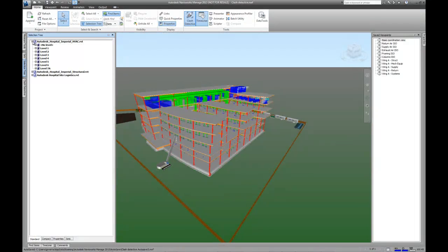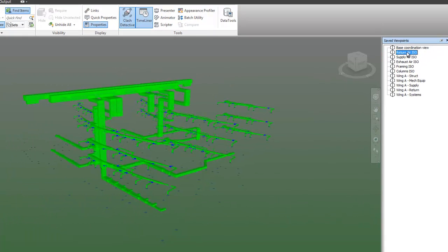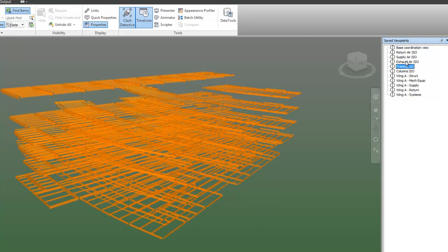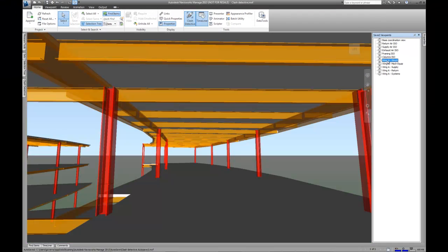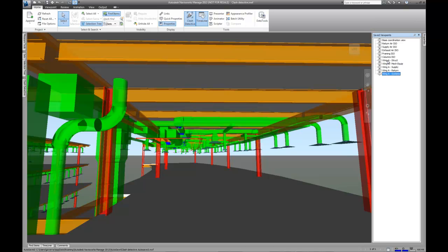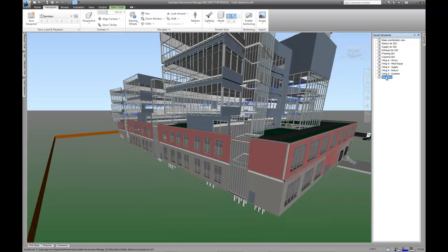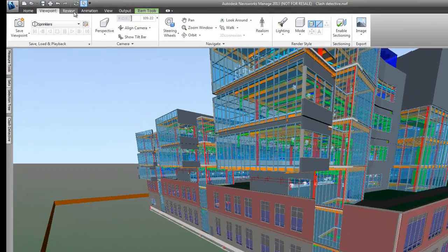Undertaking pre-construction coordination across all trades offers the best opportunity to understand constructability before work begins in the field, and to help avoid preventable RFIs and change orders that can risk project schedules and budget. Constructability models from each trade can be integrated into a single multidiscipline project model, regardless of authoring application. This is a key step to being able to coordinate these disciplines. By leveraging the constructability model, we can get a whole project view of the coordination issues at hand and begin to take steps to eliminate them by taking advantage of the work already done to create a model with construction